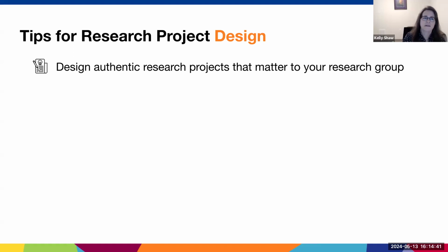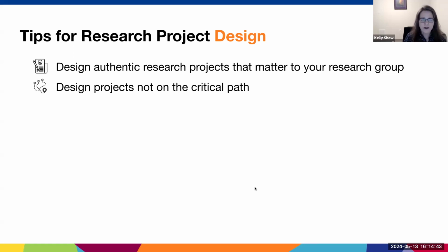They want that experience. You also want to think about designing a project for the student that will not be on your research group's critical path. And I say this because if you think about any time you were new to learning something, you made lots of mistakes. I know I do all the time. And you also were slow, right? So if there is an early deadline or a deadline that needs to be met for your research group, having a new student try to work on that specific deadline might be really hard and stressful for the student and for you. So we highly recommend designing projects that are not on the critical path,